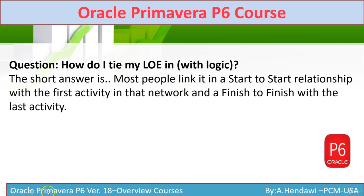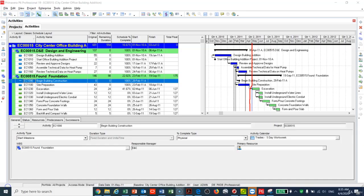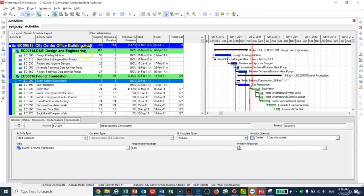How do you tie a Level of Effort activity? The LOE relationship is start-to-start with the predecessor and finish-to-finish with the successor. This gives you the correct span of the Level of Effort. Remember: start-to-start with the predecessor and finish-to-finish with the successor.